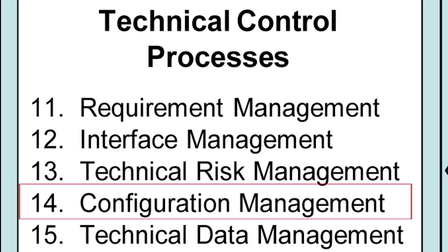Step 14, configuration management, ensures there is a controlled baseline throughout the project — one controlled set of requirements and one controlled design that everyone works from, whether you're the power engineer or the computer engineer. This prevents people from working off old drawing versions or unauthorized updates. Technical data management ensures all trade studies, assessments, and lessons learned are stored in one place, accessible to the whole team.